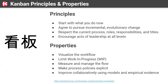Third: measure and manage the flow. If you're constantly improving, you need to be able to measure how things are going at any time, so that when you see a difference in your numbers, you can pinpoint it back to a change that happened at a certain point in time. By measuring and managing the flow constantly, you can understand which changes were positive, which were negative, and adjust as a team. You'll also track throughput — one of the key metrics — for performance, and cycle time for responsiveness.